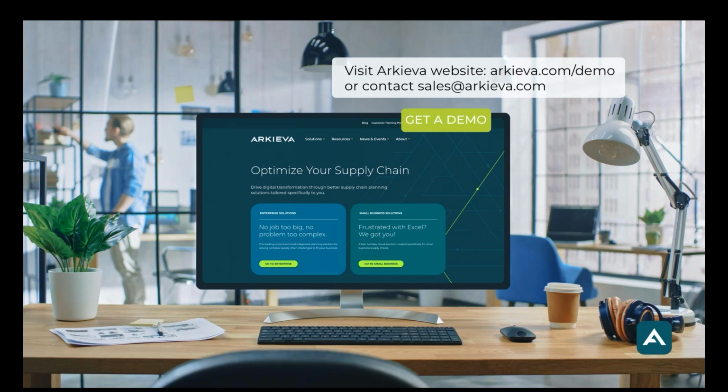Okay, great. And what are the most important KPIs to track in the first 90 days after go live? I would say the first 90 days is too short for business value, although you might be able to say, for example, if you're doing a demand project, yes, the statistical forecast in the new system is better than the statistical forecast in the old system. But 90 days might be too short to see business value, given that the length of the project itself is sometimes 4, 5, 6 months. So I would track things like use: how often is the user logging on? How often are they making overrides into the system? Use is what I would track very heavily in the first 90 days.